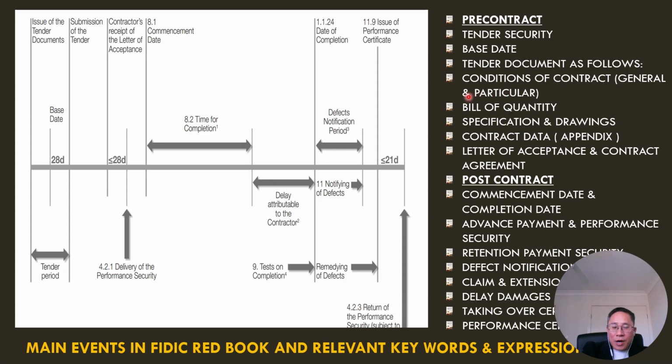For example, if we are going to award a contract based on a lump sum mechanism, but the design of the FIDIC contract is for remeasured quantity, so if we don't amend the standard conditions of contract, we will have to pay the contractor based on final remeasured quantity.